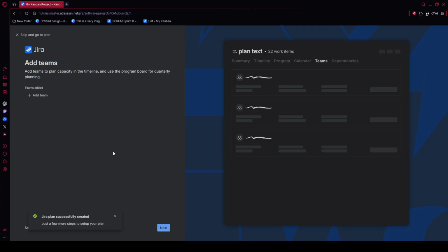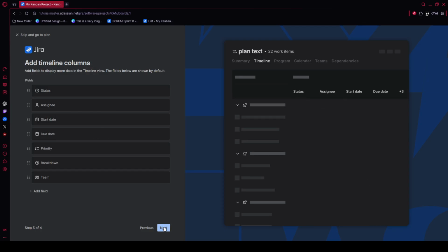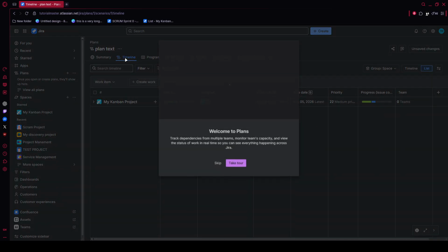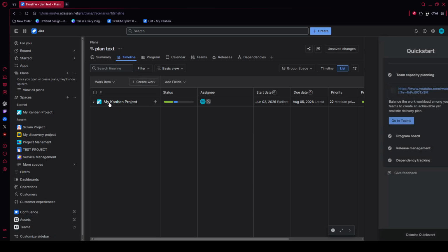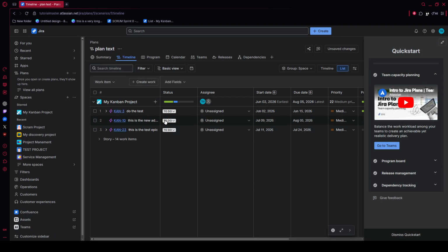After that, move to the timeline view to map dependencies visually. Find a milestone or epic bar, hover near its edge until the link point appears, then click and drag that connection to the related item in another project. This creates a visible dependency between teams and helps expose delivery risks early, especially when one group's progress affects another.